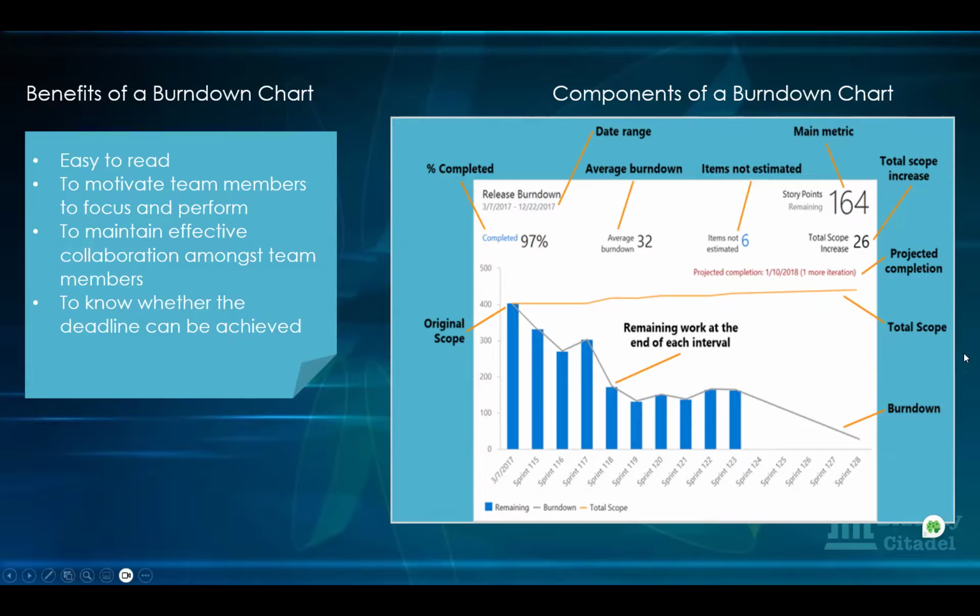And then over here, you can see that it will even tell you the work items that are not itemized. So over here, you can see items not itemized. It would give you the number. So peradventure there are any work items in the sprint that have not been story pointed, it's able to give you that. So it's left for you as a Scrum Master to go and check it, check whosoever is working on it, and reach out to the person to say, hey, this one has not been story pointed, or talk to the whole team, because it's not one person that is meant to story point anyway. It's a collaborative effort.